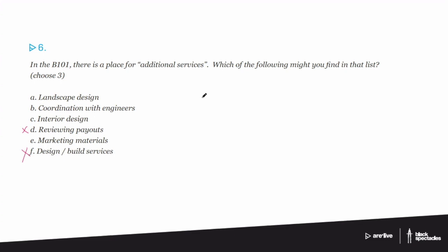And you as the architect are going to review that information so that you can help the owner understand what's going on, whether it's a reasonable payout request, and then you're going to help them go through that process and then pay the contractor. So that would be considered part of the basic services, so it's not part of the additional services.